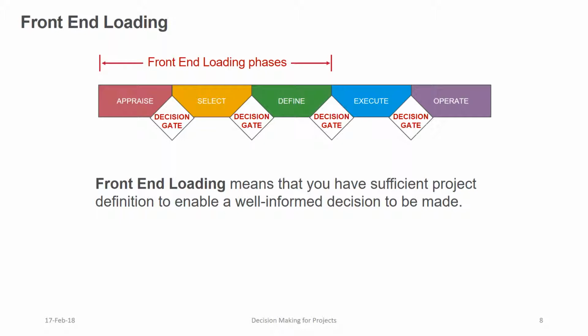So, to illustrate the concept, you should not start designing the foundations for a house until you know how big it's going to be, what its size and shape is, how many floors it has. You should not start designing the walls until you know where the doors and windows are going to go. These are fundamental aspects of front-end loading.